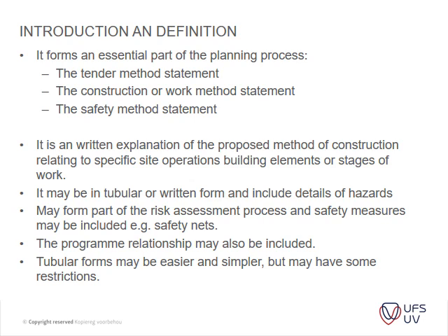Okay, so it has many forms, and it's an essential part of the planning process. You use it at tender stage, construction stage, and also you've got safety method statements, which these days within your health and safety file is a big requirement, is to actually have the correct safety methods. We'll talk about safety methods later on, how to apply it, whether you have separate safety method statements or combine your normal safety method statements with your normal method statements.